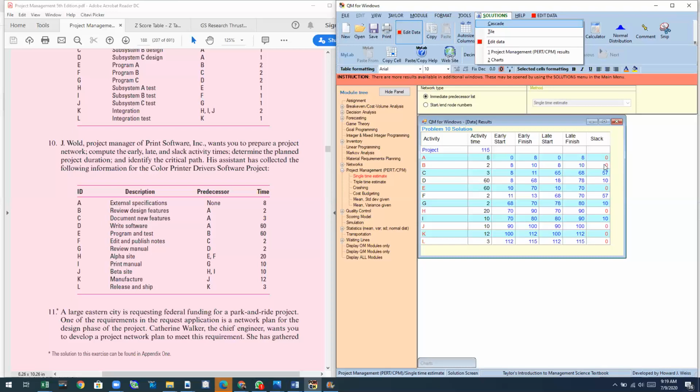Okay, and if you see 0 slacks, these are the activities that cannot be delayed. There is no slack at all, so it cannot be delayed. If it is delayed for a single day, it will push the project back by 1 day. While the activities with slack days will indicate activities that can be delayed as many days as the slack days. Delays beyond the slack days will cause the project to be delayed by the additional incremental delays above the slack time.